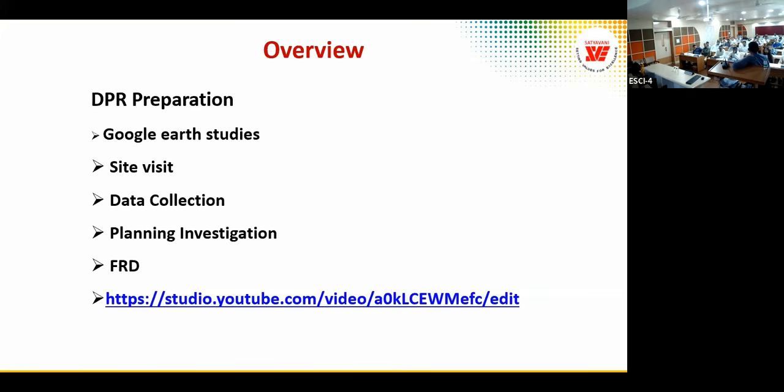We drafted in our tender and DPR that the machinery has to be CKD, and you cannot share the machinery. Suppose we have multiple locations of the project. We didn't allow the contractor to use a single machinery set for all the locations. We said if we have 6 locations, you have to have 6 machinery sets. Only a contractor who has that kind of machinery will be allowed to participate in the tender.